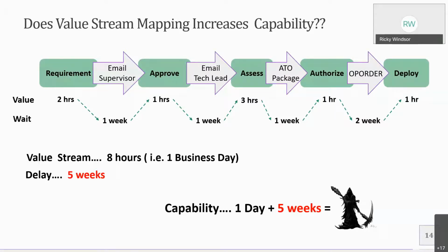However, because of either the process or the plan, but more importantly, the inefficiencies and the delays are what created that. So this is one of those elements where having an automated stream would help push that much quicker. But what I'd like you to take away from the slide is simply that understanding where those wait periods are and what that delay period is helps with the overall capacity planning, cadence, and it also gives you areas to say, okay, does it really take a week for this piece to happen?